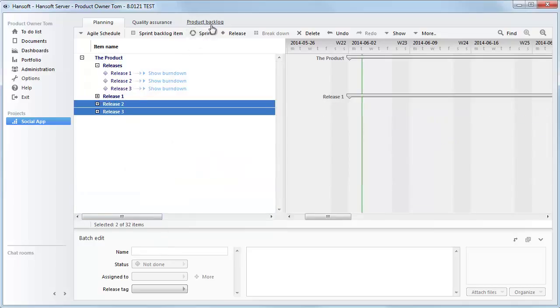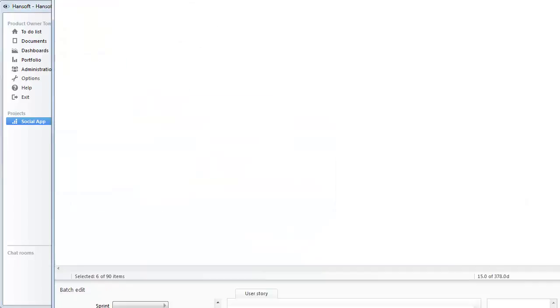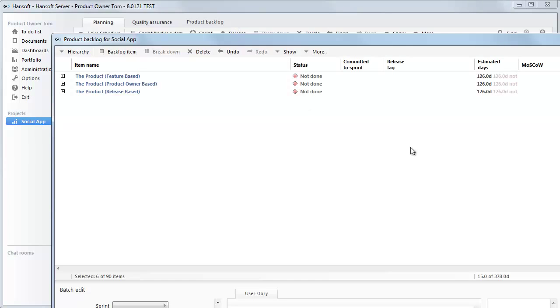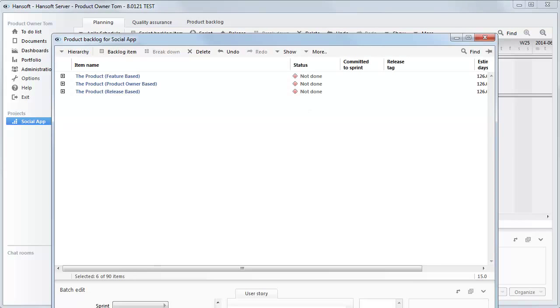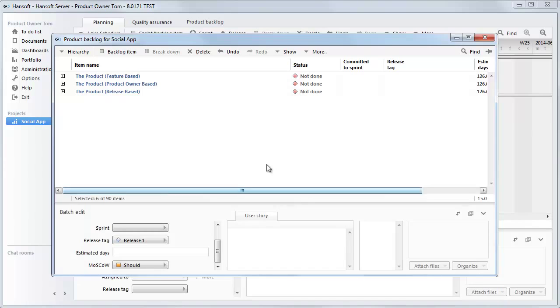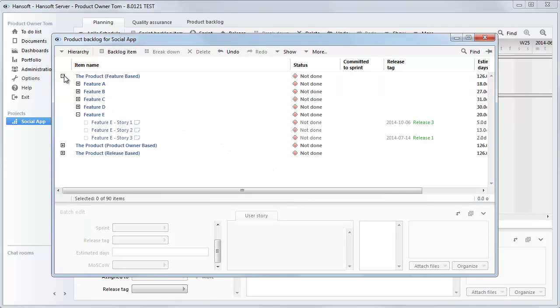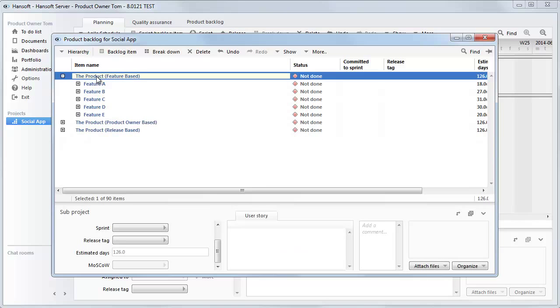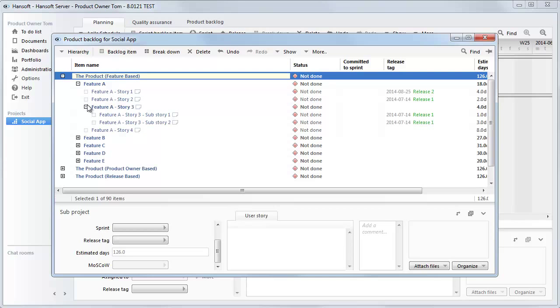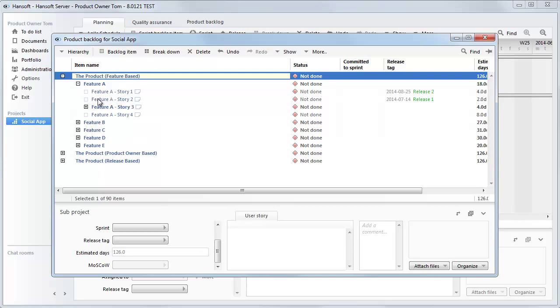If we go into the backlog, we can see here that I've given three examples of how you can structure the backlog. The first one is a feature-based structure. So here we can see that we have, once again, a root node, the product, and then we have the features underneath here. And within each of these features, we have the user stories.